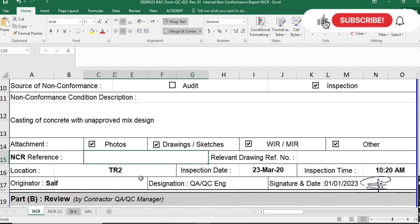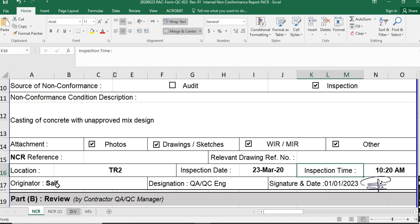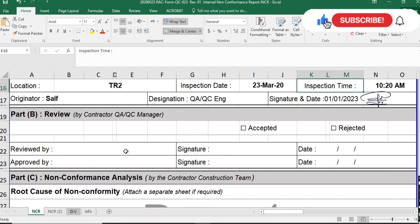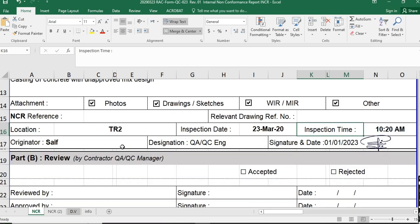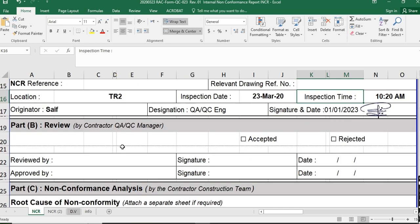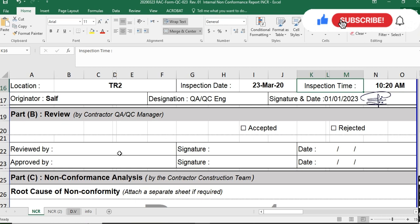You fill in the inspection date, inspection time, and originator. For example, if you are a QAQC engineer, you write your name, designation as QAQC Engineer, add your signature and date. As a QAQC engineer you issue the internal NCR, but before sending it to the construction team, you must first send it to your direct manager, which is the QAQC manager.